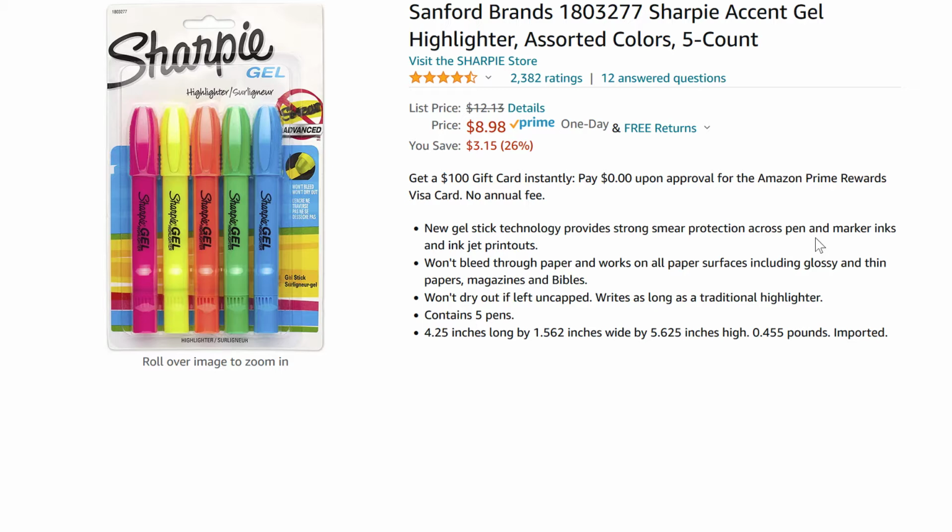As you read these documents, you need to highlight any specifications or requirements that are outside or in addition to the code. Things like minimum size of conduit, shading requirements for underground trenches, or wire size for branch circuits over 80 feet, for example. I like to highlight these things so I can refer back to them as I compile my takeoff. I generally use orange for this kind of a warning to meet the requirements.